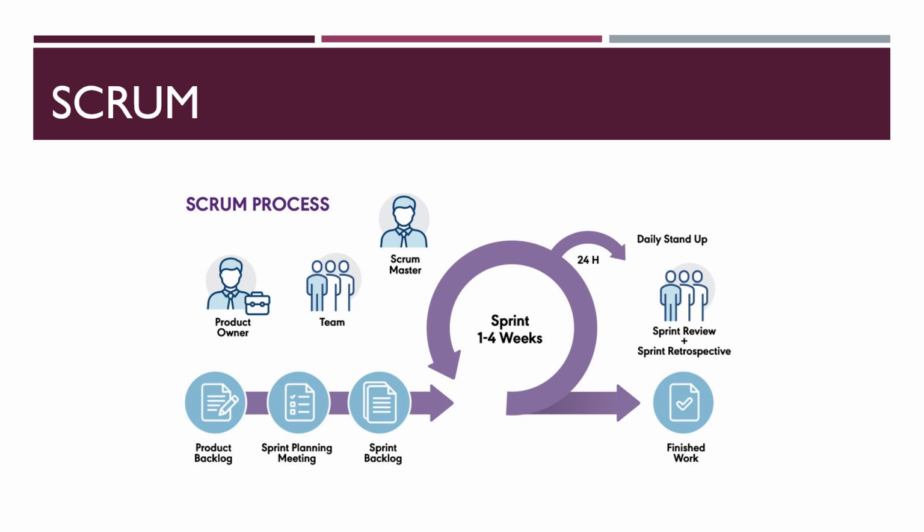Large items are transformed into user stories and epics. Epics are the large chunks of work that can be divided into stories, and user stories are short requirements written from a user's perspective. Both of them can be included in the product backlog, but only the user stories are included inside the sprint backlog.